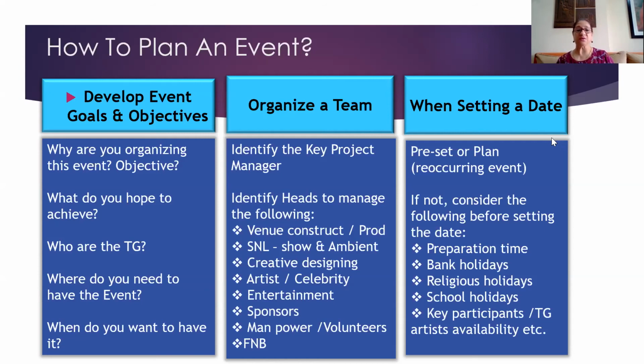Entertainment. What is your event? Who have you engaged? Is there an artist performing? Then the complete tech rider from the artist is given to the production head and the sound and light guy, so that they bring their material accordingly. Any artist you engage, you have to take their tech rider from them in terms of what they want for the band that you have to provide, and it all has to be ready for them before they come to set up.